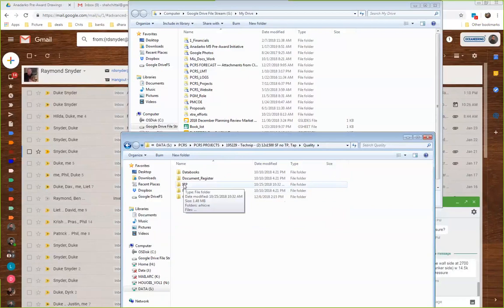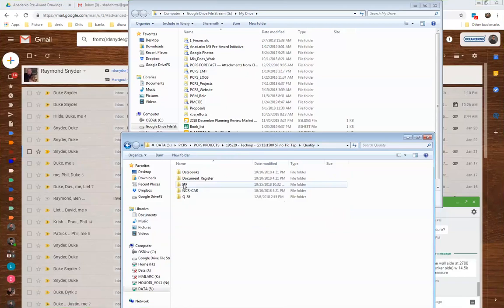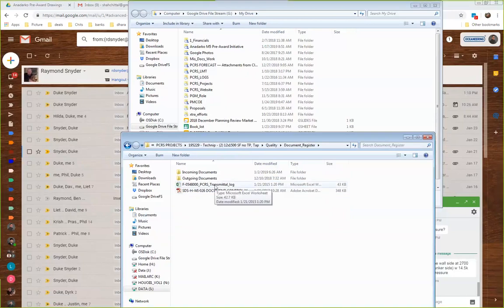There are times when you want to send the ITP to vendors, times when you want to send the ITP to customers, and times when you want to send the ITP to our QE guys, so that when you receive the parts, they inspect according to this. So there's no set system on who gets the ITP when. The EM decides, I think this vendor needs to see the ITP because the requirements apply to it. Document register: this is maintained by quality. If there are documents we want to transmit, Dina, the data book lady I was talking about, does the document transfer too.